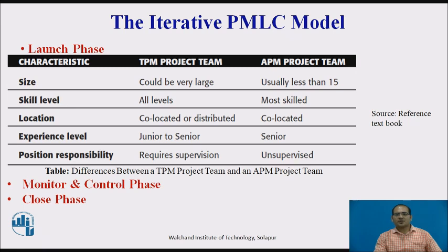There is a significant difference between the project team for traditional project management and for agile project management. In terms of size, traditional teams could be very large, while agile teams are usually less than 15. Skill level is all levels in traditional, but mostly skilled people in agile. Location is co-located or distributed in traditional, but co-located in agile. Experience level in traditional ranges from junior to senior, while in agile it is skilled and senior people. Traditional teams require a supervisor to control the team, whereas agile project management teams are unsupervised.